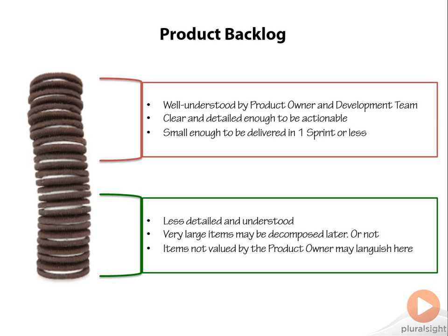It's not uncommon for product owners to represent user feature requests as a product backlog item, but prioritize it or order it very low. It's entirely possible that there is work expressed in the product backlog that will never get worked on. But we can recognize that expressing that product backlog item really was a waste of time, and it took a lot of energy to create. So we try not to have product backlog items that we're not actually planning to implement.